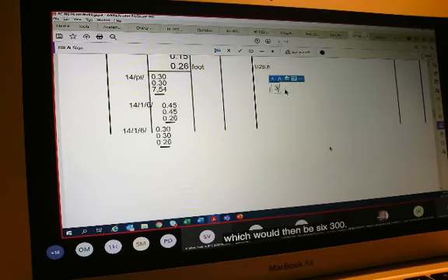That's for my top area, because I'm going with my formula that I had inserted over here of h over 6 multiplied by large A plus small a plus 4 times my middle area.